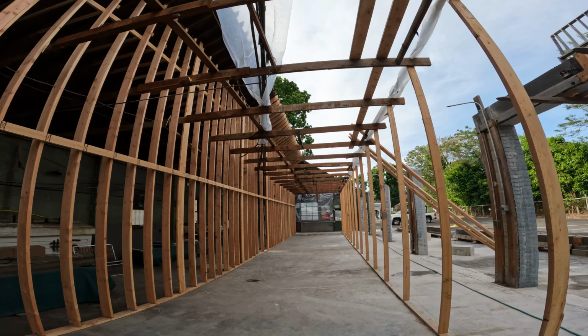But so we have Monday's Memorial Day, and then Tuesday I have another order coming, hopefully. I just put it in a couple hours ago. Said he thinks he can get it here Tuesday morning first thing. I've got, I think, 35 more 20-foot 2x6 boards. Got the rest of the rafters that we're gonna need for this side of the roof, which I don't need quite yet, but I just wanna have them here. They're all wrapped up and strapped with metal bands, so they're not gonna warp until we open those bands up. And I got a bunch more 2x4s coming.